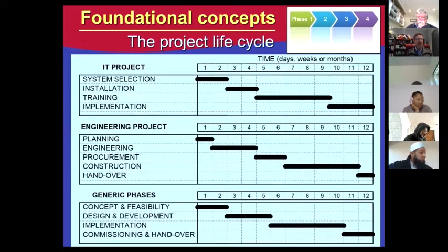I've done some interesting work with clients where we've set up project management processes for them. And the first thing that we do is to establish a life cycle. We say, what are the names of the phases that you're going to have in your company's life cycle? And then from there, we'll workshop through key milestone dates, what deliverables need to be produced, and all the project management processes that need to be carried out, and all the project management documents, such as the business case and the charter and the risk register and so on, that are needed.